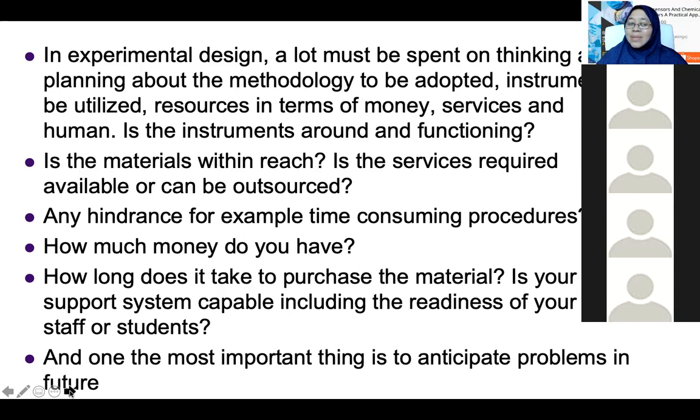So that's why when you design the first objective, and under that objective, you design the experimental design or the research design, you have to consider the time factor. Because in the end, you will have to do what we call a Gantt chart. So now instead of 1 month, you design it to be a bit more than that, 2 months, because you are considering the factor of instruments broke down, or you need to queue, right?